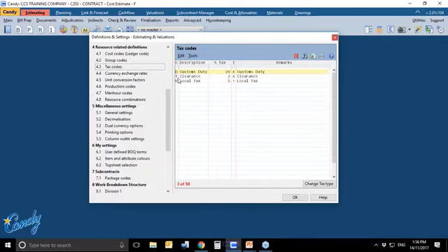Now, the tax codes that you define are alphabets. You can define a maximum of 50 tax codes. We've defined our tax code for customs duty to be D, the description, and you've also got a remark similar to the currency code. The tax for the customs duty is 20%, and you've got tax types. Here, customs duty is defined as a compound tax type. You also have another tax type called a simple tax type.